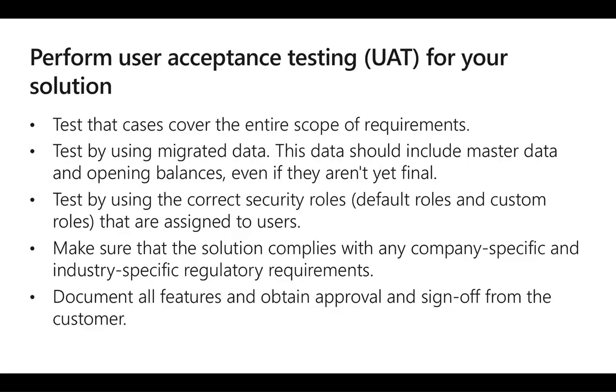Test data cases cover the entire scope of requirements. Test by using migrated data. This data should include mass data and opening balances, even if they aren't yet final. Test by using the correct security roles, default roles, and custom roles that are assigned to users.